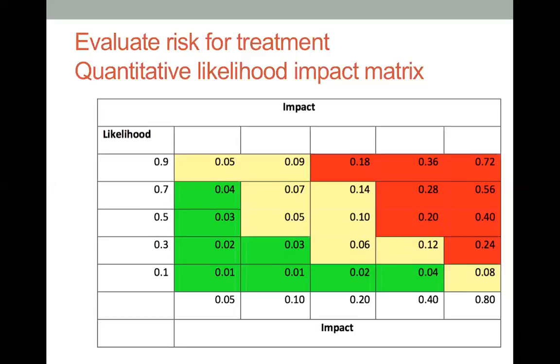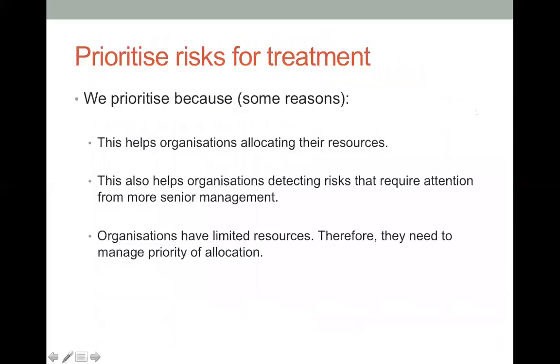Certain department manager. And the one in the middle here, which is moderate, we normally, as the project manager, step into that risk to help the relevant stakeholders address the risk. Okay, so that helps us detect which one we need to elevate, which one we allow the normal procedure to solve, and which one we need to step in as the project manager to help solve the problem.